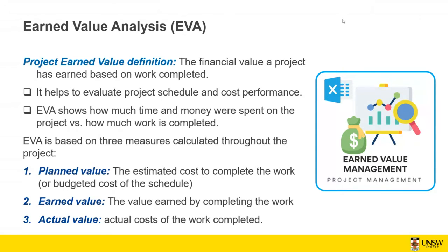And based on that, you can forecast how, from now on, the project is going to proceed and whether there is any big impact on the budget and the time of completion. So you can do all these calculations, and it depends on the project. For example, for a 1-year project, maybe you can do this earned value analysis each quarter or each month. Or if it's a longer project, let's say a 10-year project, you can do it every quarter or every 6 months or every year.